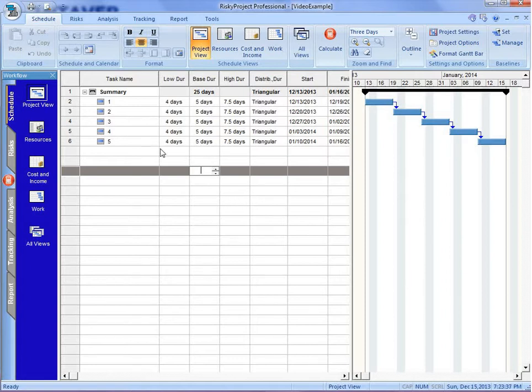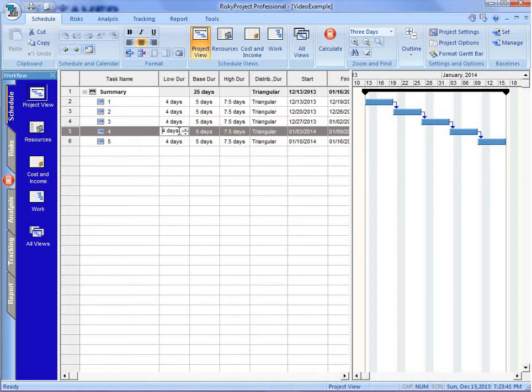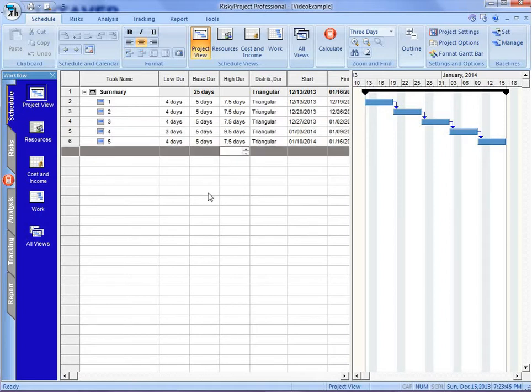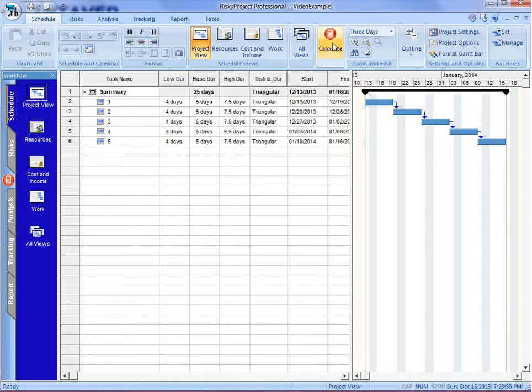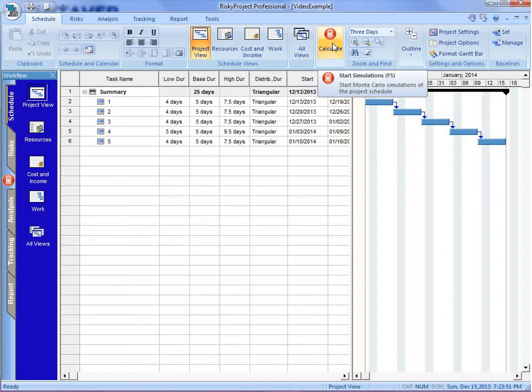Once we've added that data, we can run the Monte Carlo simulation. Just for our purposes, I'm just going to make one of the activities a bit more risky. Go and click the Calculate button, and we've just run 5,000 simulations.